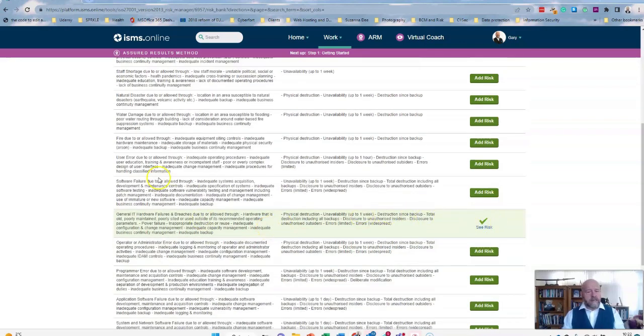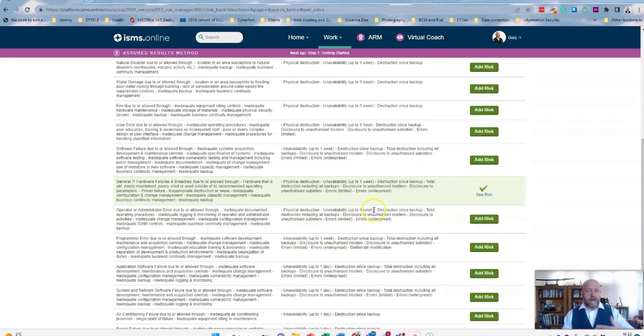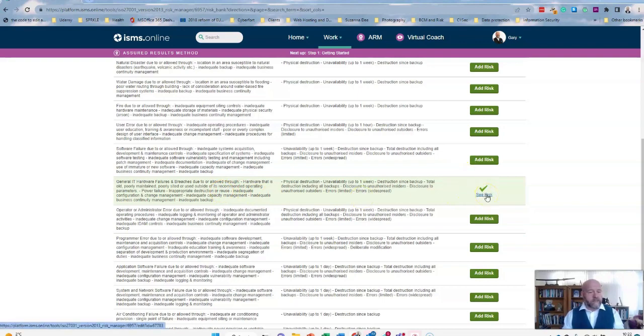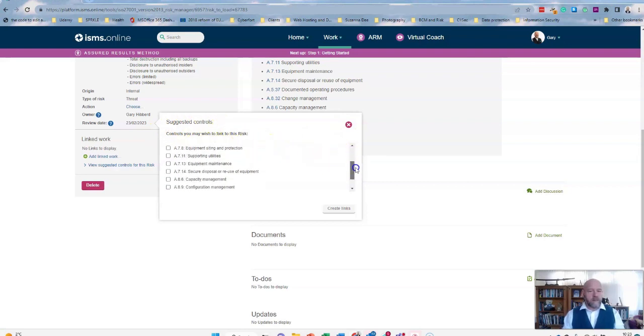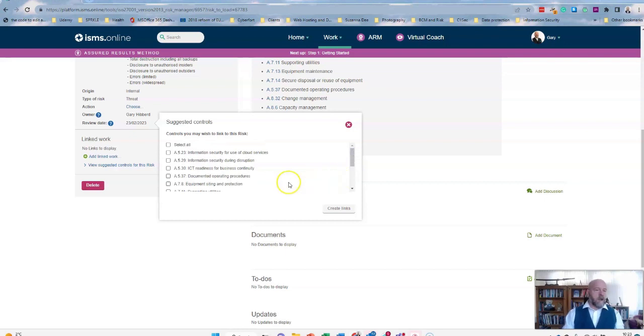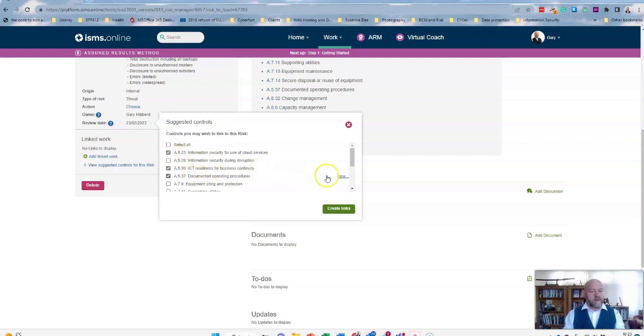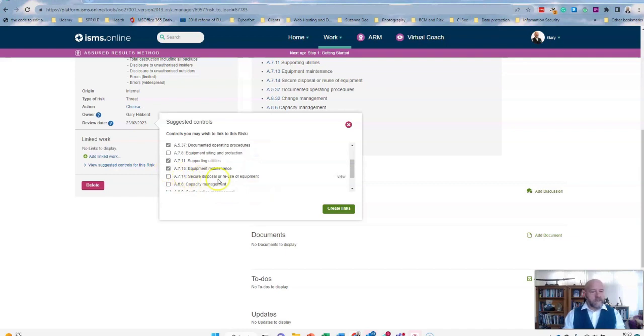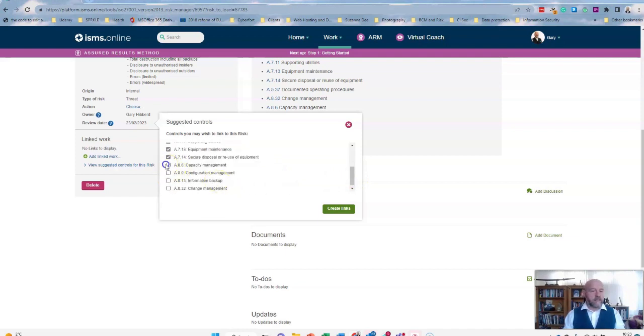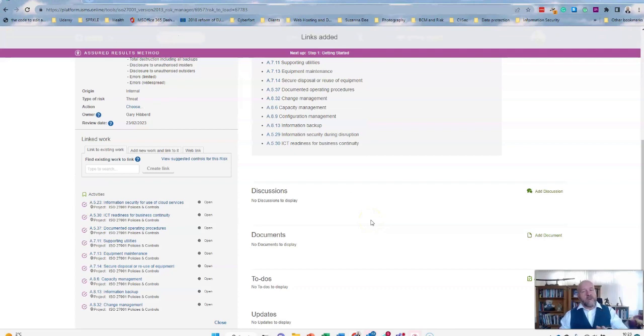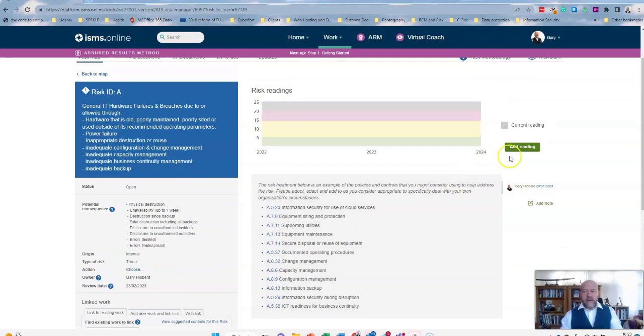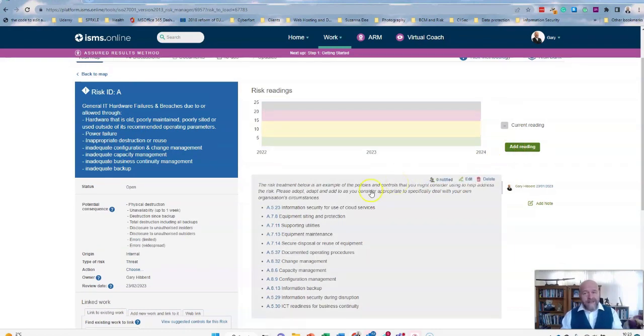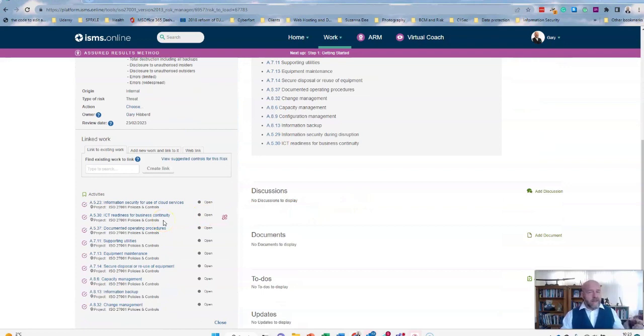So you can add this risk into the risk register, and you can just work through these all these risks here. And as you see there now, I've added that, you can see you can actually go and take a look at what that risk is, which we will do right now. So there is the risk, suggested controls which you should be looking to put in place. Where you say, well, actually, you're right, actually we do have a business continuity plan, we have documented operating procedures, we have information security for using the cloud, for instance. Obviously we have equipment maintenance and supporting utilities, and we provide this. So all of the controls that you might say are applicable in this particular situation, we'll create the links to those. So again, not only are you adding the risks to the risk register and allowing you to decide on what the impact is, it also links back to the statements of applicability and the various different controls, very important and also something that is quite often missed.